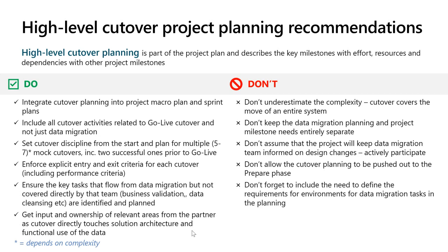One of them is set the cutover discipline from the start and plan for multiple cutovers, right? And I've put 5 to 7. It really depends on the complexity of your cutover, right? For very simple cutovers, you may not need that many. You may be able to get away with 2 or 3, but for most business application cutovers, you will find that you need more than you might anticipate at the beginning of the project.